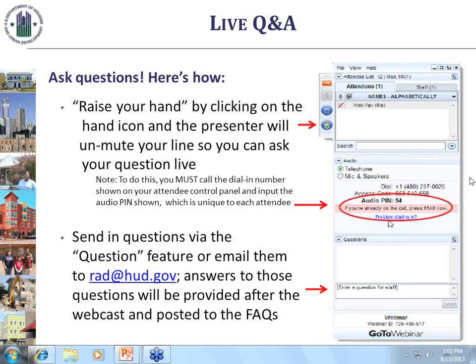So what you have to start with is that public housing projects, properties, whatever, are defined today by AMPs, Asset Management Projects. And there's roughly 7,300 of them across the country, or 1.1, 1.2 million units. So that's how we track projects in public housing today. PHAs have designated an assemblage of units into asset management projects, and that's how we do it. So that's our unit of measurement.